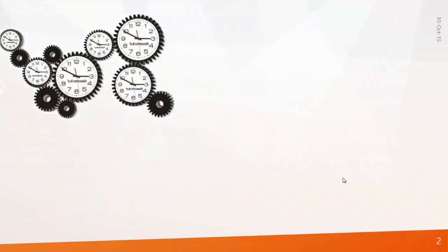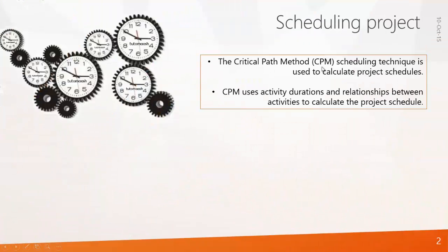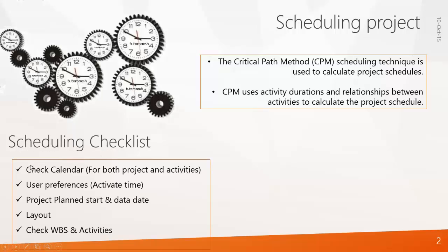Scheduling project in Primavera is using CPM technique. And before you schedule, please check the calendar, user preferences, plan start and data date, layout, WBS and activities. The importance of these checks have already been described in our previous videos.